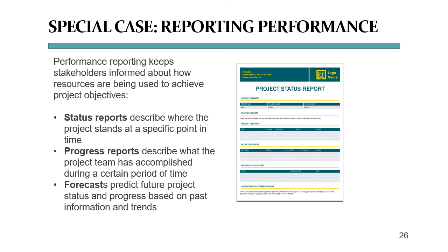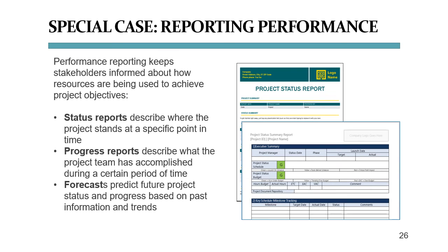So we have the status reports that describe where the project stands at a specific point in time, progress reports that describe what the project team has accomplished during a certain period of time, and forecasts that predict future project status and progress based on past information and trends. Very often you may get a little template like the ones shown here to fill out, and it looks so easy, doesn't it? Until you have to provide the information.